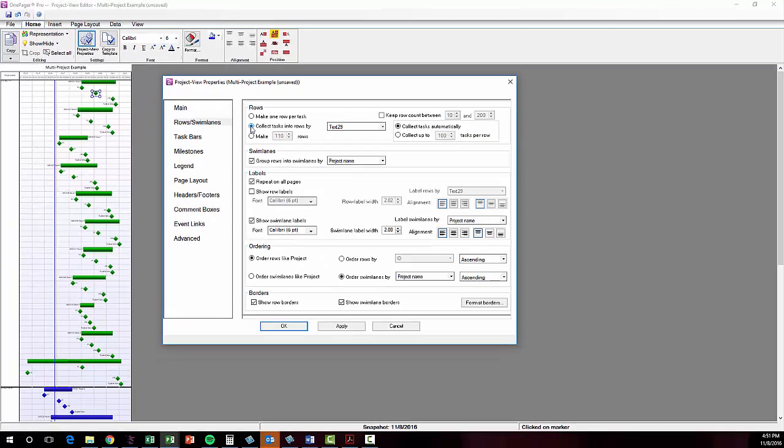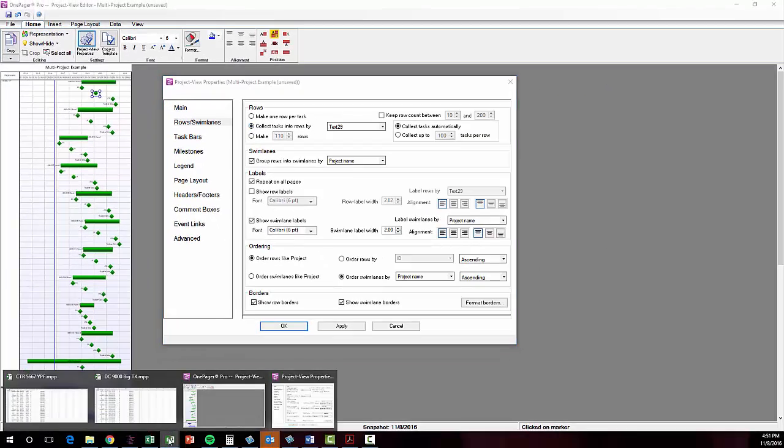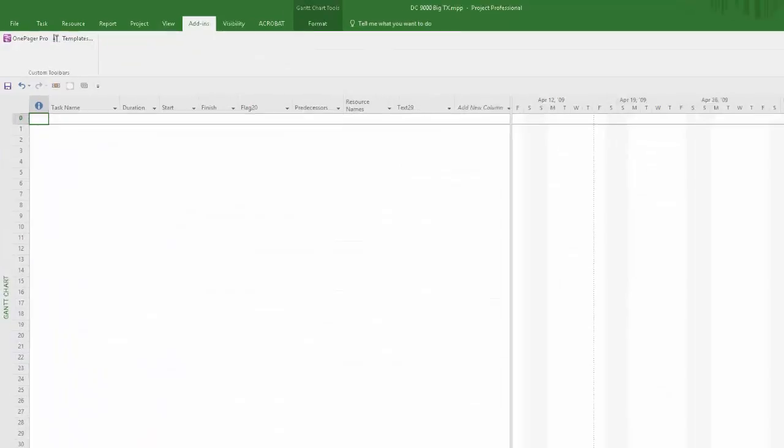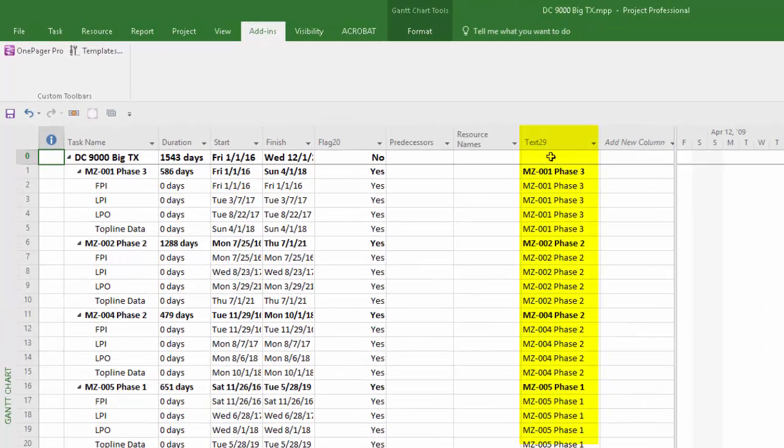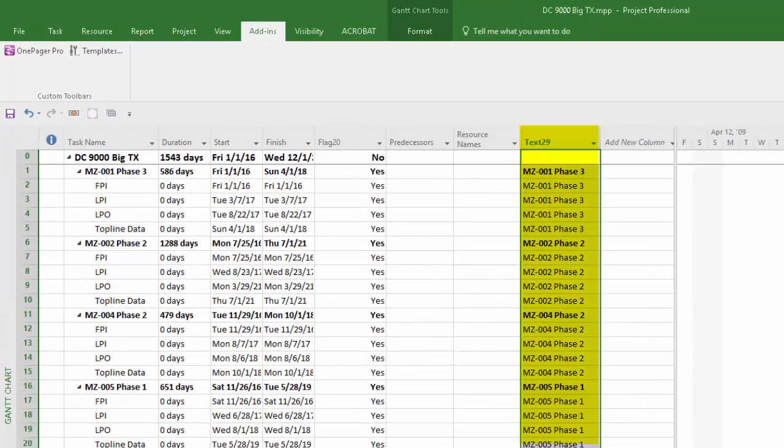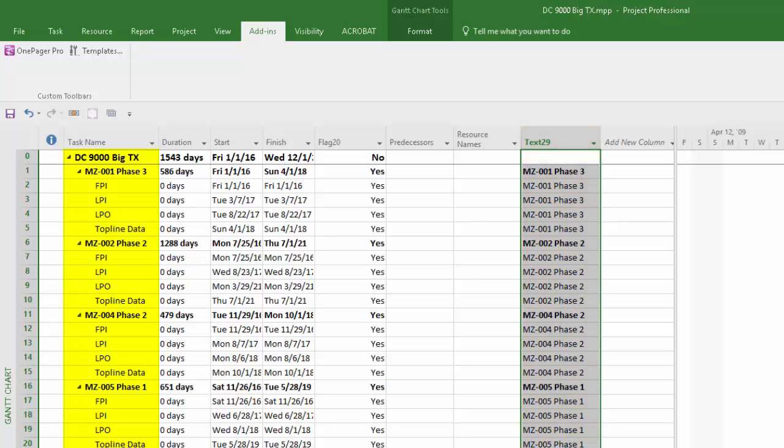Let me jump back to Project where you can see the values I placed into the Text 29 column. Basing your settings in OnePager off of common values in a text column is particularly helpful when your outline levels in your project files aren't consistent.